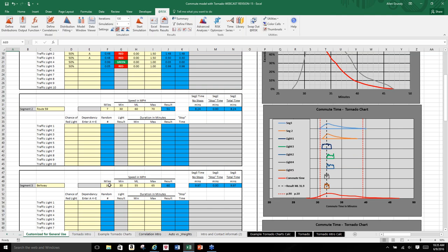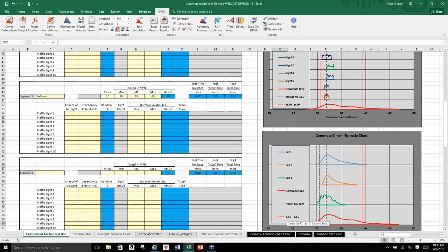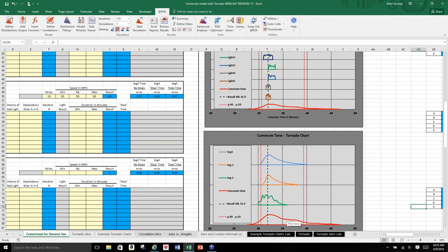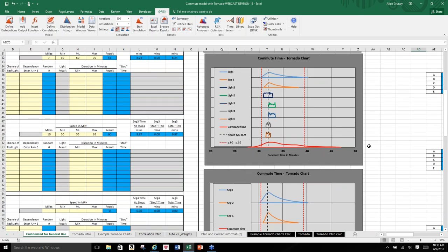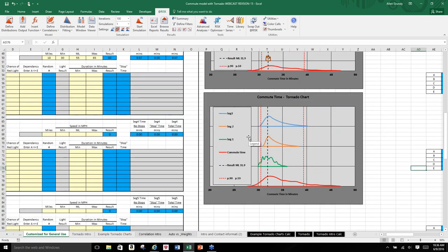since that has more of an effect, since it's more miles, that is going to have more of an effect than the shorter distance one. So that makes sense. You also may want to put things all on the same level rather than looking at and comparing each of these stoplights individually, with the longer segment 3 and segment 2. Maybe you might want to just combine segments 1, 2, and 3 all into one distribution. And so that's what you see here. I just got segment 1, 2, and 3 all compared to the same.